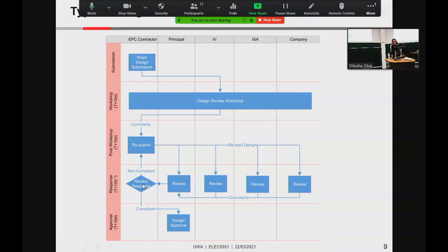So if somebody says, oh, this part of your design is not compliant, you are like, I don't agree because this is the reason it complies. Or somebody says, could you please add another cable? Okay, so it's going to change my whole design, and my design is compliant based on requirement number 2500. So this is where sometimes, even if your design complies, you find a middle ground.